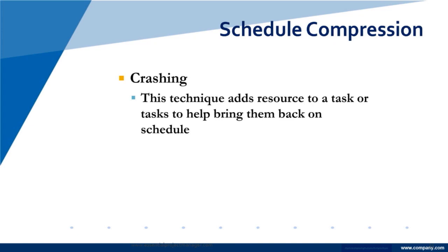You crash a schedule, you throw people at it. You make people be the parameter. If you say, I only need one person, I'm going to add five. And can I get it, instead of a week, in a day? Sometimes that can happen, not always, but it is a technique that we use in project management to be able to control the schedule, to balance things. Sometimes we use it in the course of managing a project. Sometimes it's just when we plan it. We talk to people, we go, well, give me three people, then I can have this done. Crashing the schedule is usually a compression technique associated with being behind, but not always.